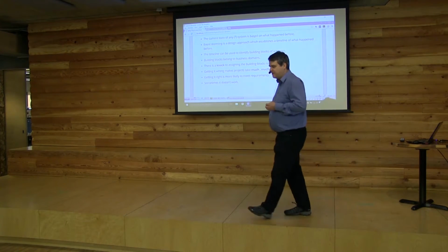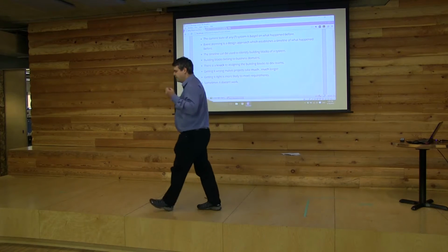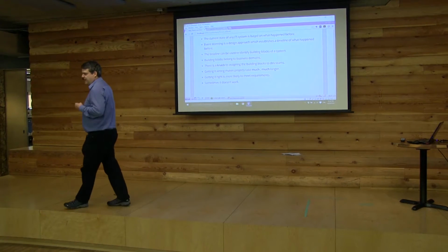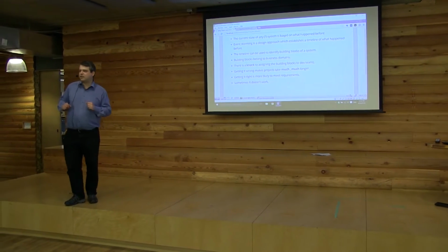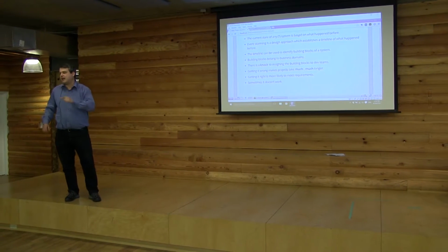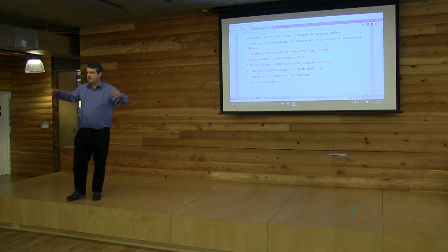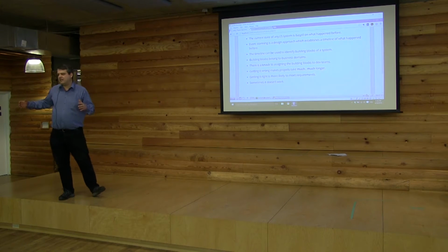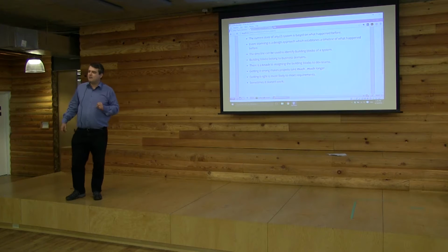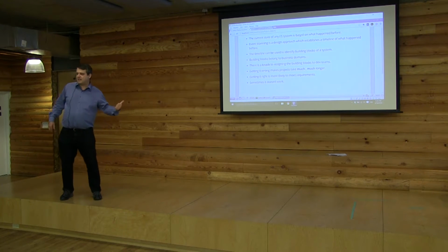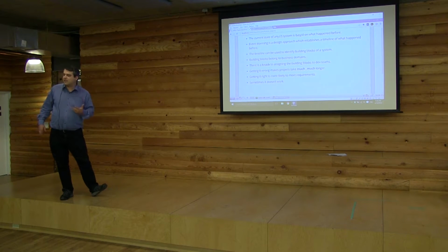That's because the building blocks, if they map onto the business domain well, determine how much communication has to happen between teams and team members. And the more communication that needs to happen, especially between geographically separate teams and team members, the more delays you get, the more disconnects you get, the slower things get.